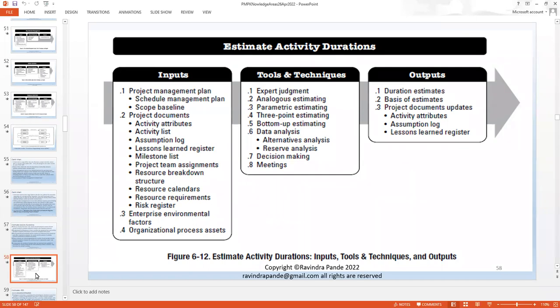Prior to their departure from our office, we try to estimate the activity duration, where we have estimated this activity at, let's say, 18 hours. That's about 3 business days. Again, some companies use 6 hours a day, some 8 hours a day, so depending on your organization, we normally plan such activities accordingly. We also include the unit testing part, the initial quality check. And in most scenarios, if it's remote work, we might send the QC engineer with them as well, to make sure he completes all the quality control checks required to confirm that part of the deployment is complete.